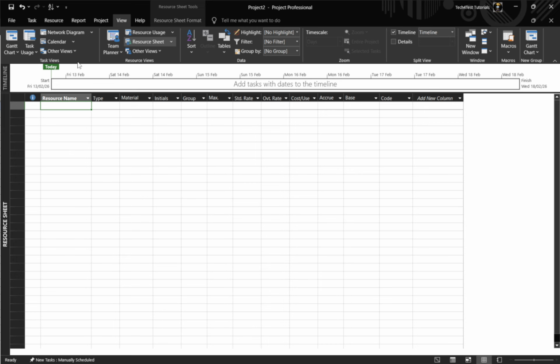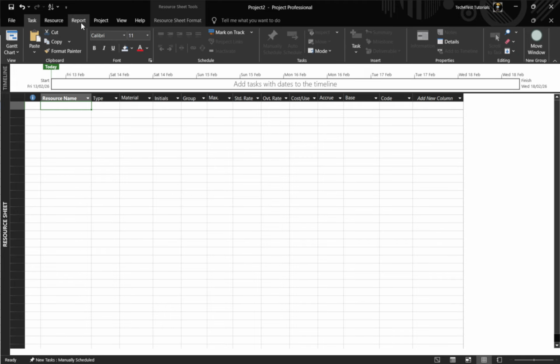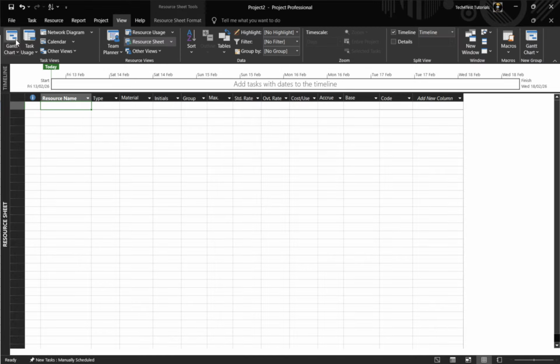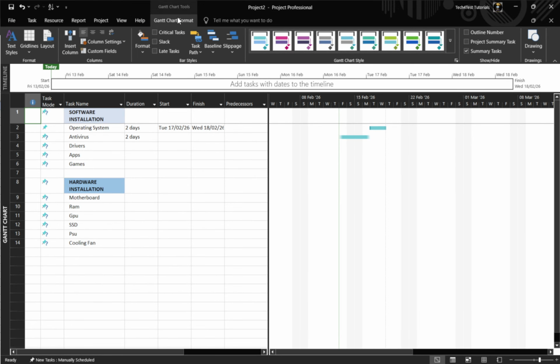Turn on the critical path to understand what drives your end date. In the Format options, enable critical tasks. The tasks that appear highlighted are the ones with no wiggle room. If they slip, your whole project finishes later. Keep an eye on these when making changes.